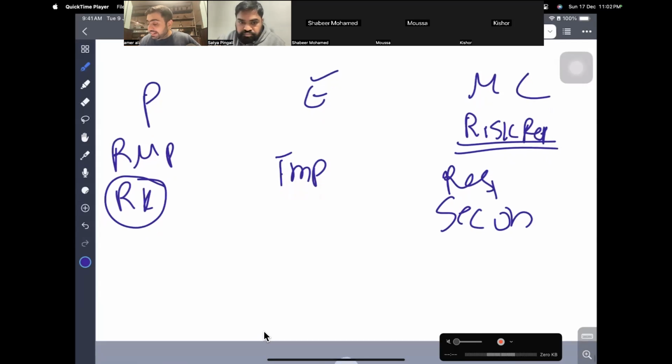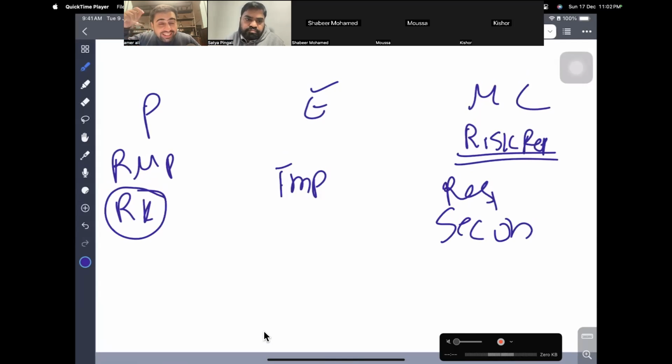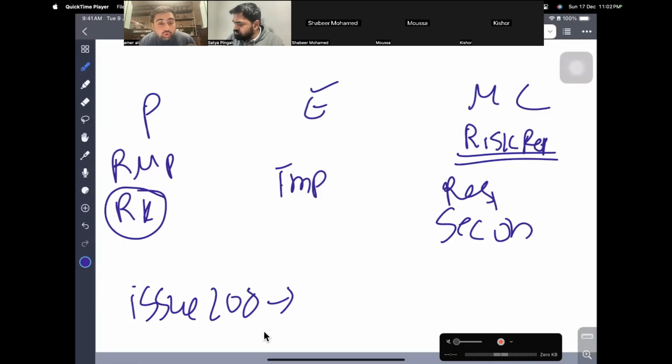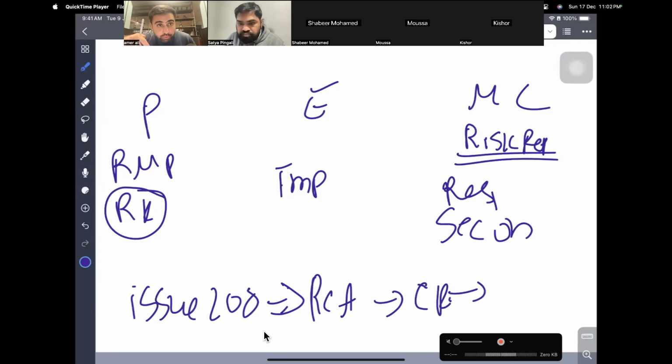Now, anything that you did not identify and that happened, you put into the issue log. Once you put it in the issue log, you do the root cause analysis of why it was not identified. And if needed, raise a change request to handle it. Once handled, implement the response. If that can occur in your project, you will update the risk register, and for sure we will update the lessons learned register for the future.